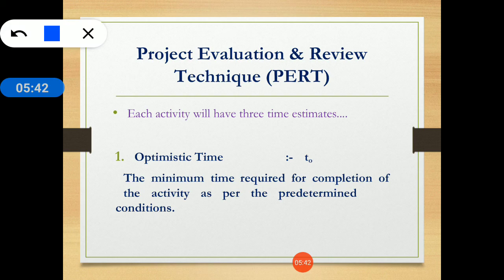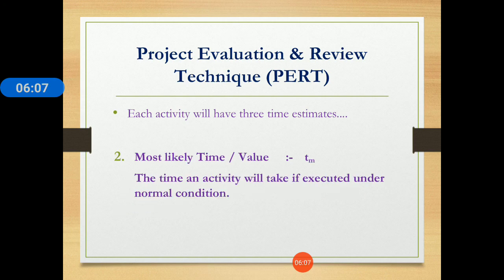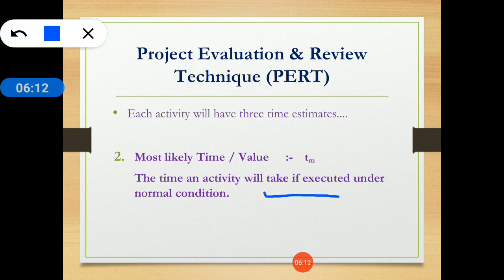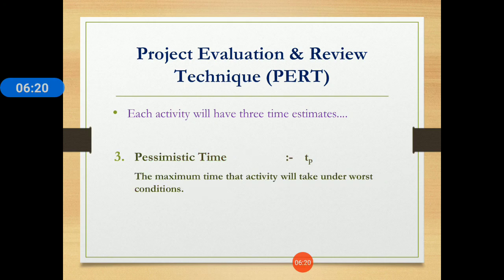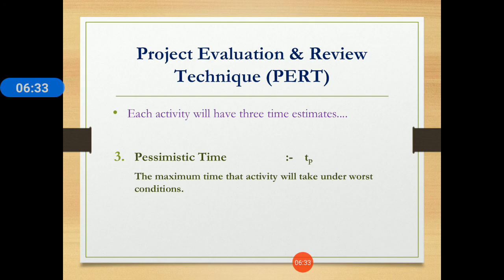Optimistic time is the minimum time required for completion of an activity under predetermined favorable conditions — the shortest time you expect the activity to finish. Most likely time is the time the activity will take if executed under normal conditions, meaning the average time. Pessimistic time is the maximum time the activity will take under the worst conditions — if any worst-case condition occurs and the activity finishes in the maximum time, that time is called pessimistic time.